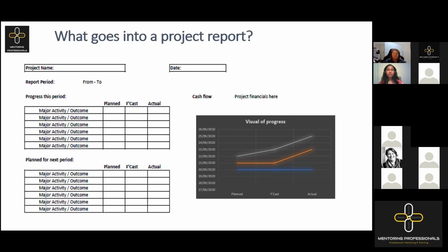Yeah, and every single time we start a new management stage, with those work orders that you're sending to suppliers, your scope of works, your work packages, those things that you are sending to your suppliers should also contain your requirements for how they need to report progress to you. So, crunch point for people that work with agile teams. Okay, so for example, a Scrum team, how are you going to get that report?